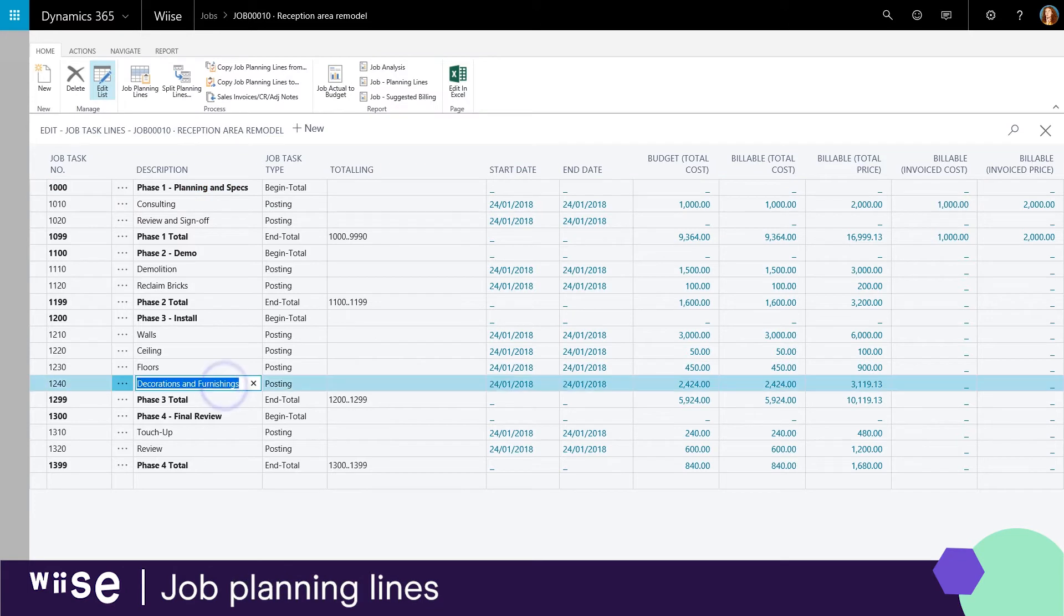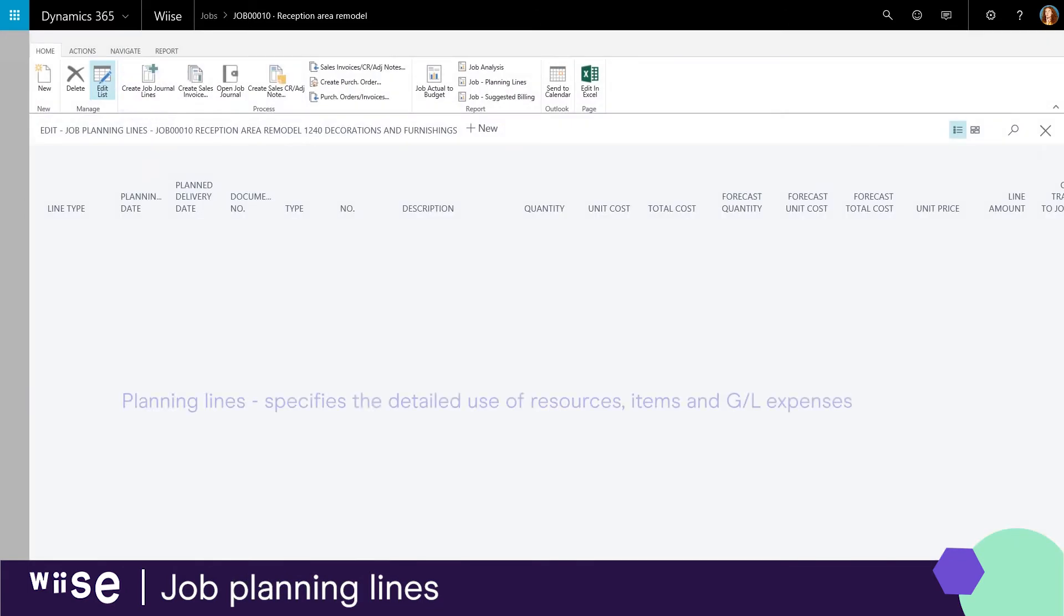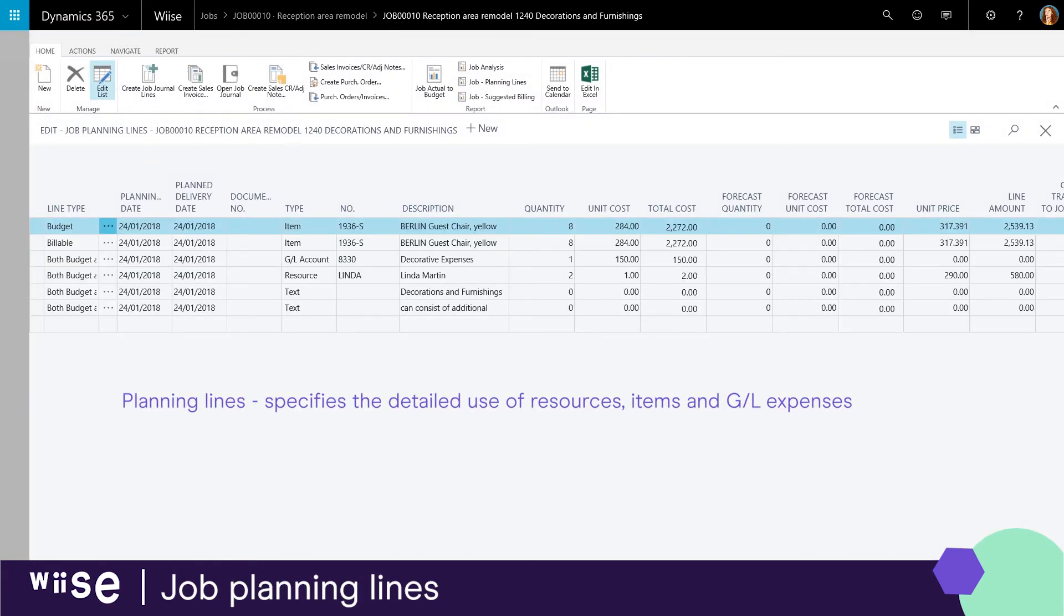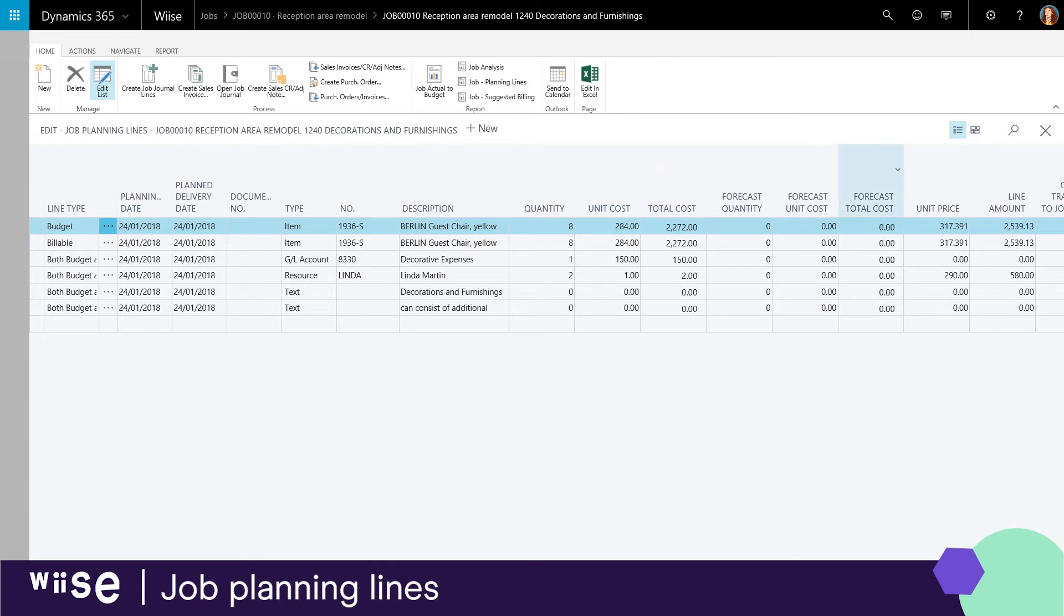The second layer consists of planning lines which specify the detailed use of resources, items and various general ledger expenses. All jobs that you create can be separated into task lines and planning lines.